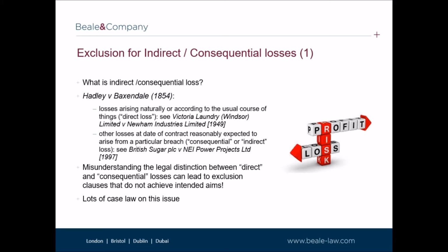The court held that by using the words including without limitation, the parties were identifying the type of loss that could fall within the exemption clause, so long as it met the prior requirement that the loss was of indirect or consequential nature, it would be excluded. It meant in this case that again, direct loss of profit was not therefore excluded. So it follows that if a consultant wishes to exclude liability for, say, loss of profit, this must be clearly stated in the contract.